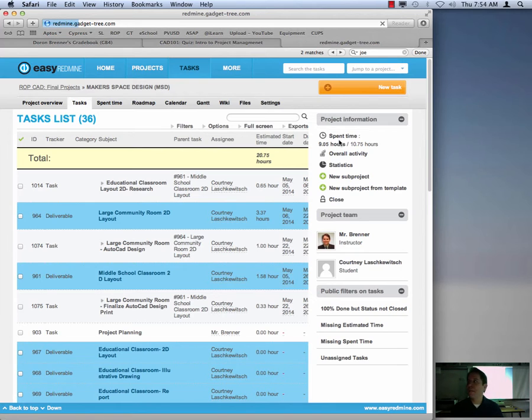You have a minimum of one task that you're completing or plan to complete each day. If you have a task that is going to take more than one day, then you have broken up that task into subtasks. So you are completing at least a minimum of one task per day. And you need to log time for those tasks.